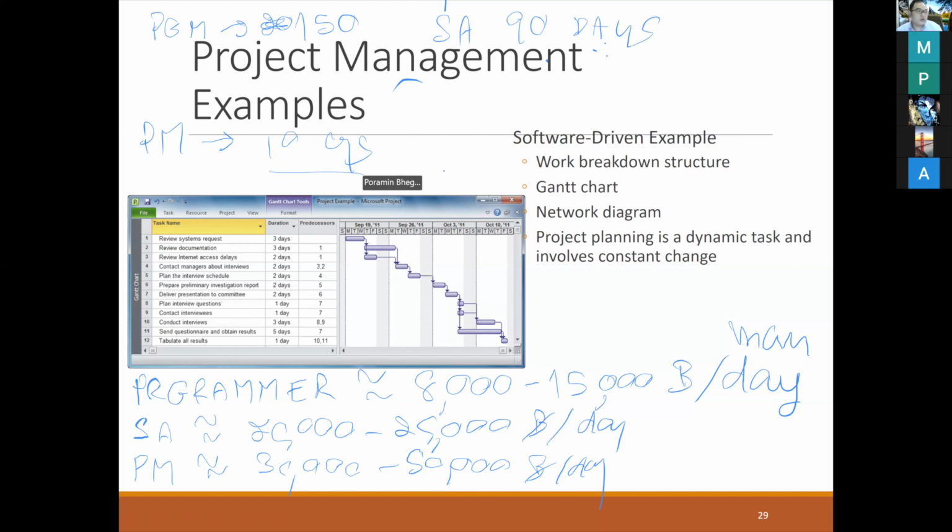These are the money that you charge the customer. You multiply by the rate นะครับ, so this is the money that the customer has to pay you นะครับ. We don't charge other things to the customer นะครับ; normally we just charge the human resources that our company has to spend นะครับ, except the software and hardware that we have to buy licenses for นะครับ.